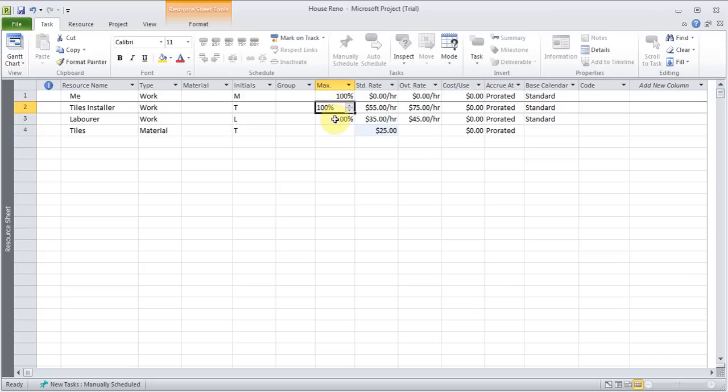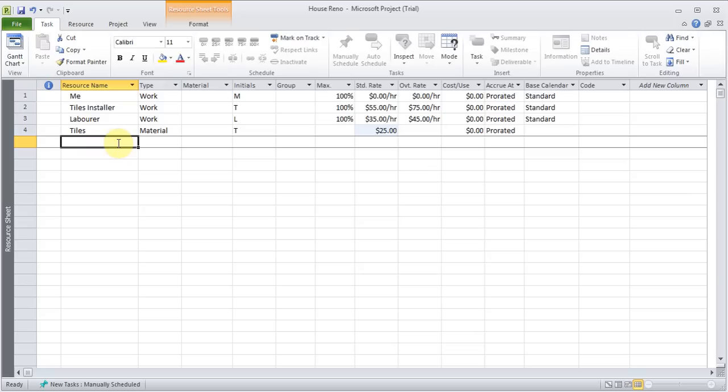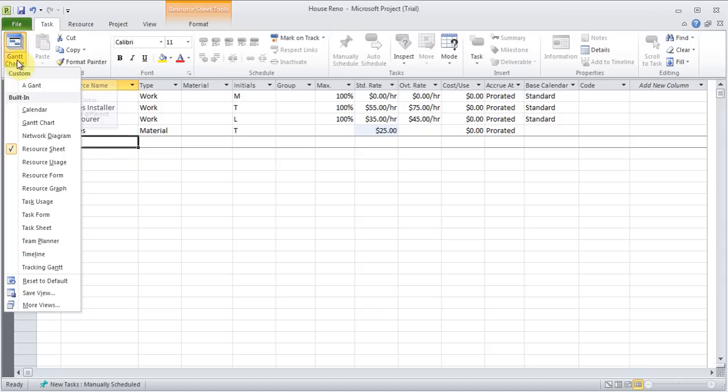If for example, I had two people laborer, I could make it 200%. So that would mean two people. Now if I wanted, I could put like a cleaner, someone who's going to clean the place if I wanted to do that. But I'll show you another way of doing this. So now let's go and assign these resources to different tiles. So I'm going to come back to the Gantt chart, either from here or from there.